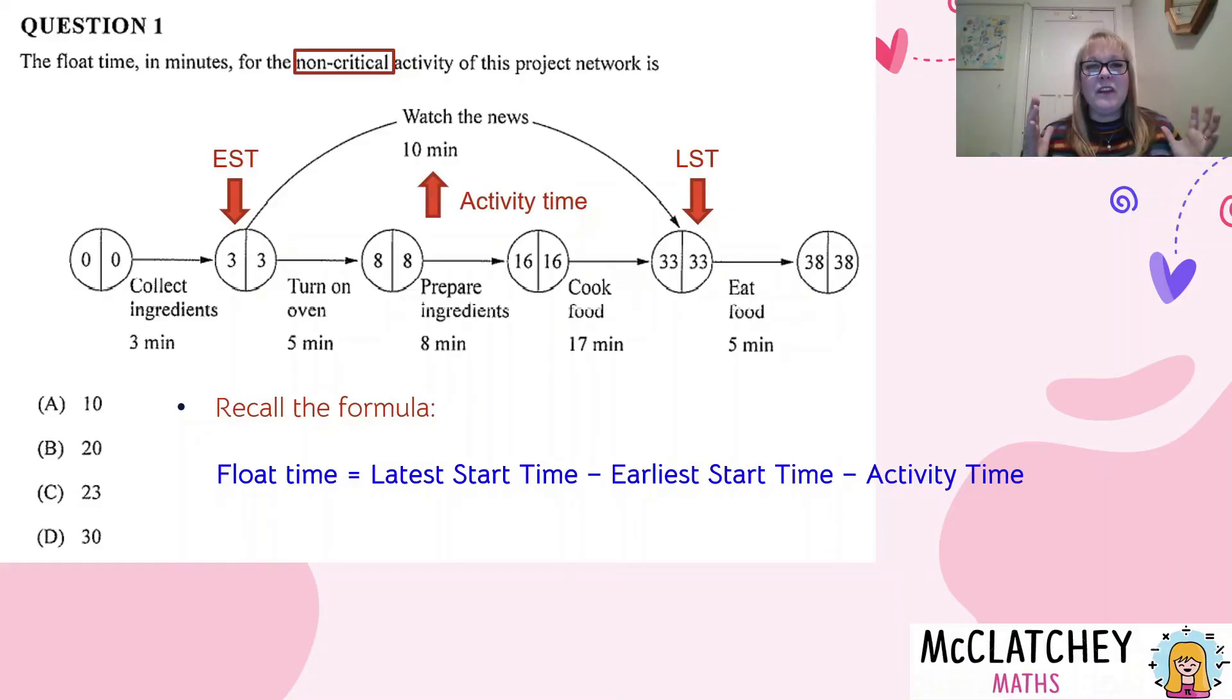A nice, easy way that I remember this is if we look at this latest start time here, it's the outside of that activity. And then the other sides outside of the activity take away the middle, how long the activity takes. So what we've got is 33 take away 3 take away 10, which gives us a float time of 20 minutes.